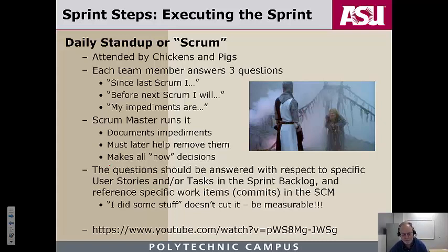The Scrum Master, again, will first make the now decision in order to keep the team moving. All right. You don't want to walk out of a daily stand-up and have the Scrum Master say, hey everybody, wait a few minutes, let me try and resolve this, and I'll get back to you later today, right?